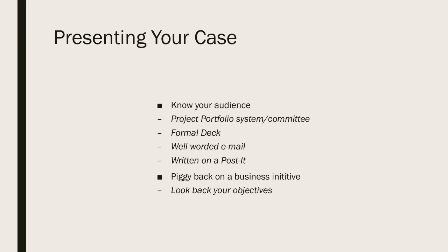But let's say that you want to deploy SD-WAN. Not only is it an expensive project, it's pretty disruptive. You've got to hire a team of consultants. There's going to be some OpEx spending. There's going to be some CapEx spending. You're going to have to engage a project manager. There's going to be a formal project put together. This is not a small project for most decently sized organizations.